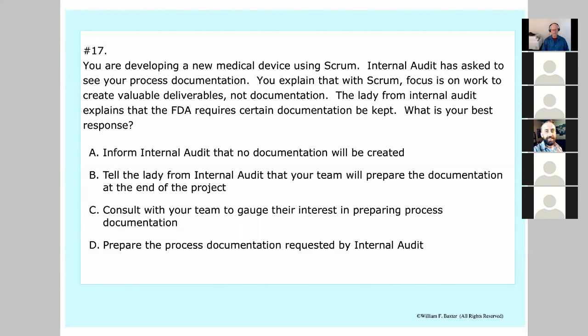Delta. Delta. Yeah, very good. So despite your agile mindset and despite all the principles of agile and the preference for working software over extensive documentation, the reality is if you're doing medical devices and you're subject to FDA requirements, there's going to be some process documentation that you need to maintain.